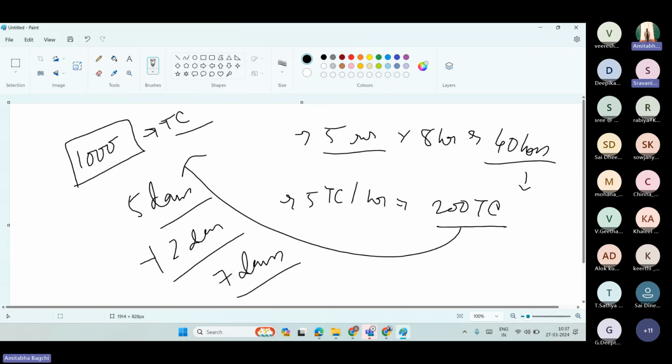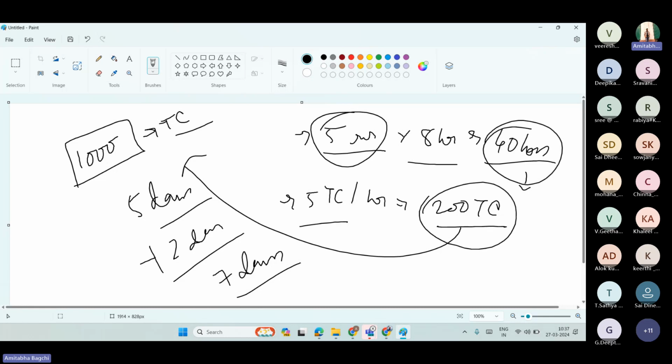If that product manager comes to me and says, boss, do it in 3 days, why are you taking this much time? I'll have a proper document. That's why the test plan is required. I'll say to the product manager, boss, you see, I have 5 resources, 8 hours per day, 40 hours, they write 5 test cases per hour, 200 test cases. You tell me how 1000 test cases can be done in 3 days? Getting my point? That's how a manager also tackles the higher authorities.